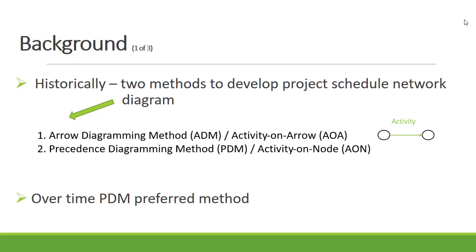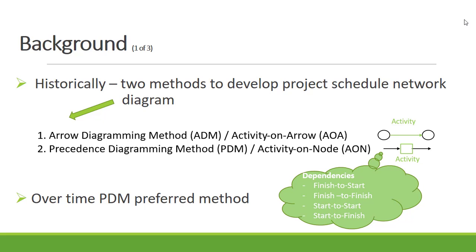For the activity on arrow, the activity is represented by an arrow, and the activities are then linked together with nodes. For the activity on node, the activity is represented by a rectangle or square box, and they are linked together with arrows. The arrows represent the different dependencies: finish to start, finish to finish, start to start, and start to finish. It is important to remember that for the activity on arrow, we only use the finish to start dependency.